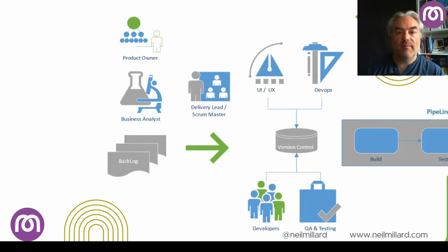Following Scrum or Kanban practices, the team will come up with a list of tasks based on the product owner's feedback. They'll be defined, prioritized, and sometimes estimated. The product owner will work with the business analyst to create a list of tasks to do so that it can provide value back to the business. Sometimes team members create tasks if they found a bug or a feature, for instance. This work is added to a backlog.